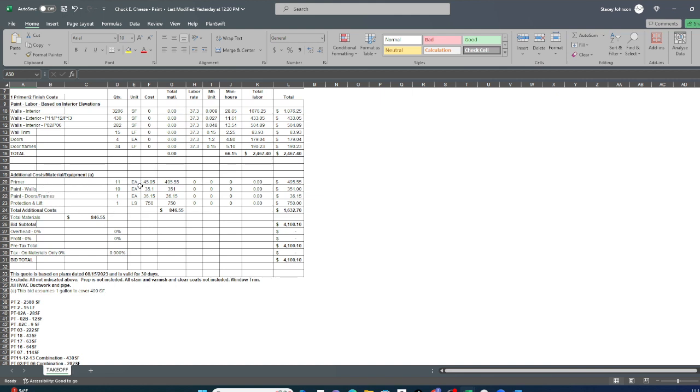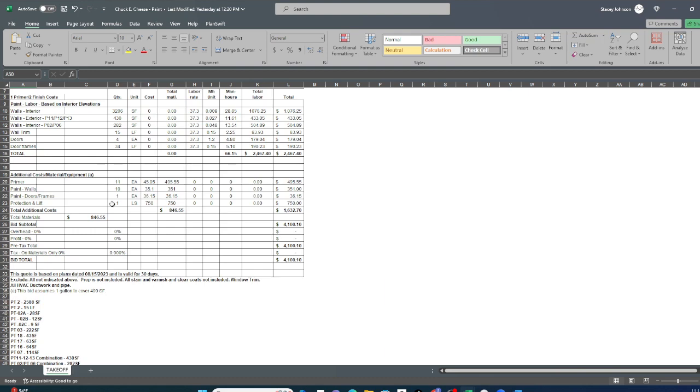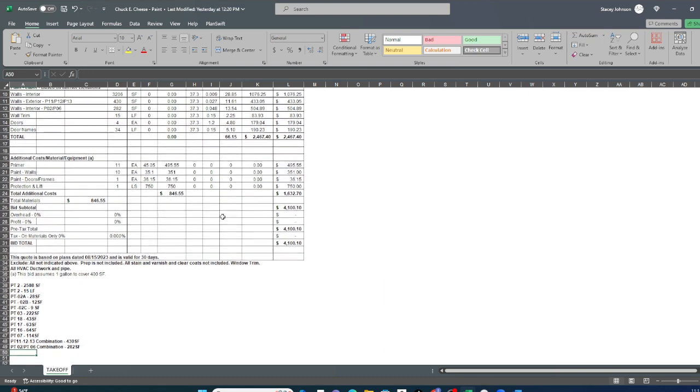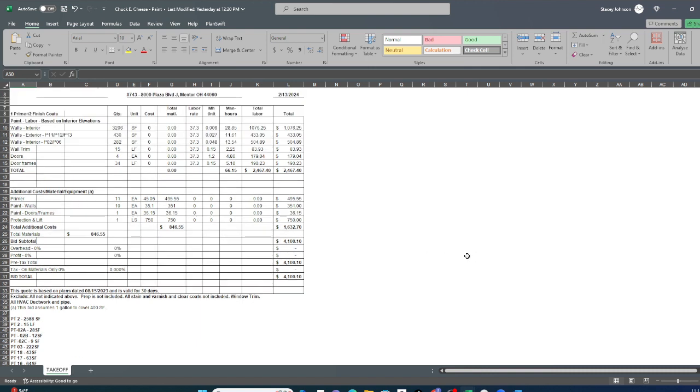And then the material. Now it says that we assume that one gallon will paint 400 square feet. So that's how we determine how many, and this is gallons. So we know that everything's got to be primed. So we add up how many square foot in total, divide by 400. Bam. How many primers? Same thing with the paint all the way down. And then you're presented with a very detailed painting estimate.